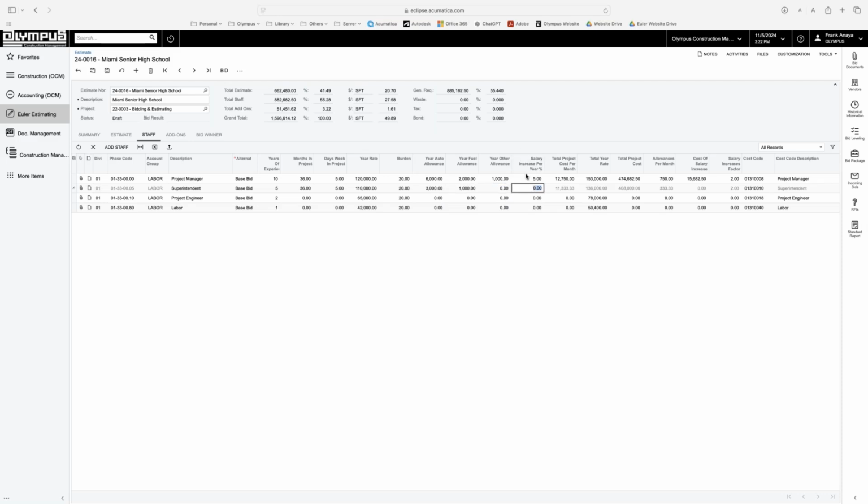In long duration projects, you want to make sure you get covered for everything. After 1 year of work, you need to do a review of your employee, and this guy is going to ask you for a raise. So this is how we have accountability for that too. I'm going to apply a 5% raise increase, and we're going to be raising these guys in 36 months twice, 2 times in 3 years.